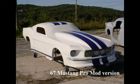Calibration cost, a certified technician needs to calibrate the new dyno for accurate readings within a tolerance of ±0.5%. This one-time cost is $2,500, reflecting higher precision calibration. Software upgrade, the new dyno requires a software upgrade, $7,000, for compatibility with LJRC's existing data acquisition system, ensuring seamless data integration. Contingency buffer, a 15% buffer is allocated for unforeseen costs, considering the complexity of the new dyno.